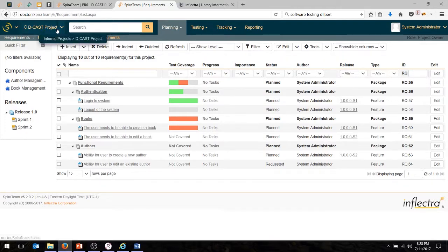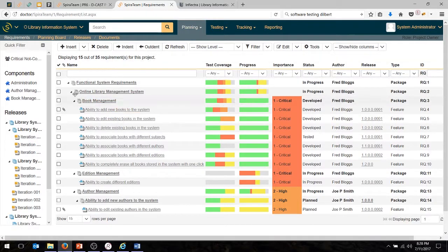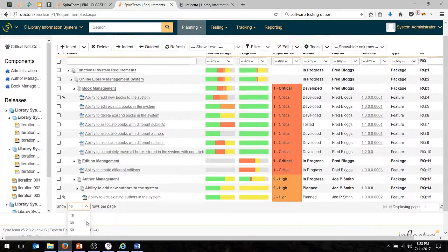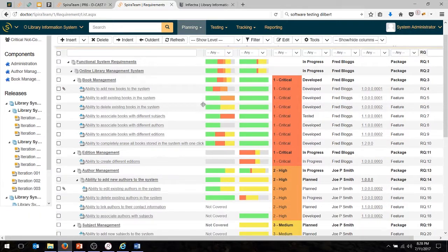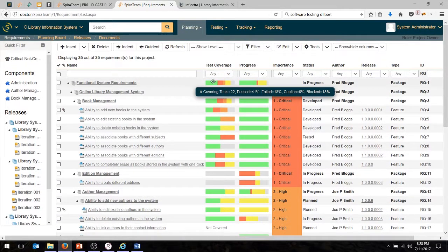And if you go to a bigger project that has potentially a little more data in it, like this one, you can go up to the top of the hierarchy. You've got this more complex hierarchy, and if I show, let's say 50 rows, you can move to the top of the tree, and you're going to see there's a total of 22 tasks, of which 41% is passed. This is rolling up all those subcomponents up to the top. They're not pie charts, but we use this little indicator where it's green, moves from left to right, and you have red, orange, and yellow. Where you see green, it's passed, where there's red, it's a true failure, and orange means it's a borderline warning case, yellow is a block, you can't actually execute it, and gray is stuff that hasn't yet been tested.